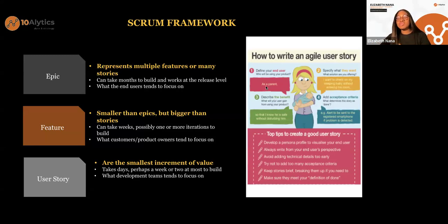The very first step would be to identify who is the person that is going to be using this nanny cam. Is it a bricklayer? Is it a teacher? Or is it a parent? All right. You define who your end user is. For example, as a parent, you don't say as a project manager, oh, as Elizabeth, I'm the one working on the project, so I'm going to build everything from my perspective. No, you want to identify who the end user is, and that's the perspective you want to write your user story from. So we start off with as a parent.